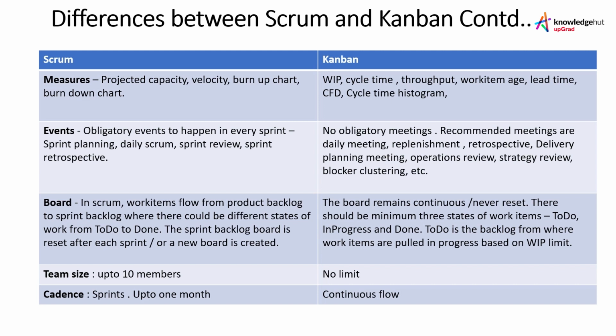So this is a whole graph which gives you a very good picture about the overall progress. It gives the average cycle time and other things. What is your normal? How many work items are falling above the normal or below the normal? So it's a cumulative flow diagram, which tells you the health of your workflow. And then we have the cycle time histogram, which is built using the cycle time. It gives you a graph of the cycle time, okay, how it is getting spiked up or down, and how many work items were at the average or were above the average or below the average. So that is the cycle time histogram.